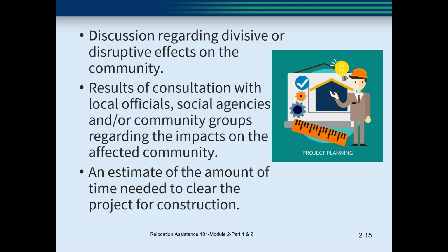So what else is going to be in this report? You're going to have discussions regarding the divisive or the disruptive effects on the community. If you put a new alignment through this part of this community, is it going to separate emergency response services from the other side? Results of consultations with the local officials, the social agencies, community groups regarding the impacts.